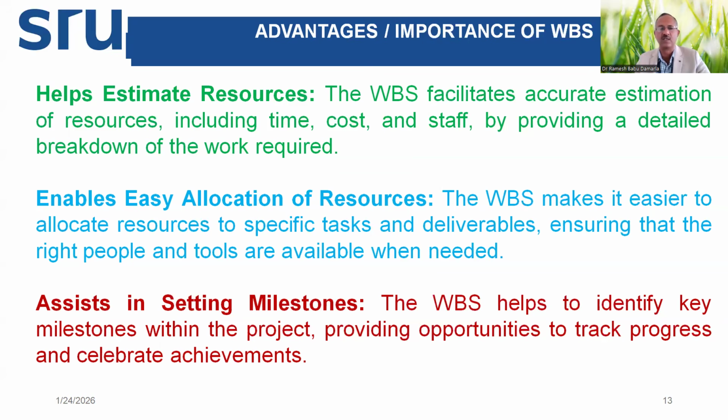Similarly, car body structure assembly. Like bending, fixing, cutting, welding, painting, all assemblies, the car body is ready. It can be a milestone. Then battery and components assembly can be one milestone. Like that, an AI-based car can have 10 to 15 milestones. Then one will know clearly how much is happening, how it is getting completed successfully.